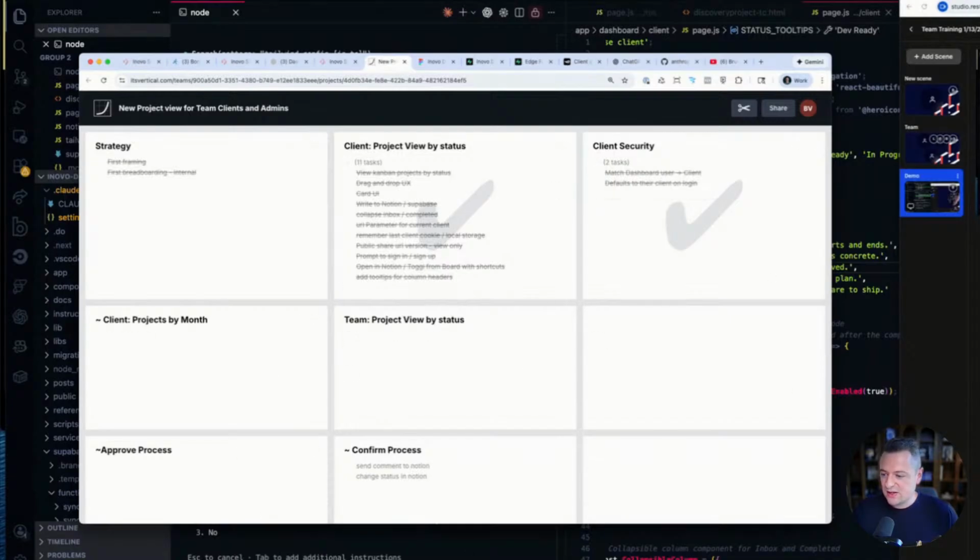So we typically go in and build those out here. You can see we don't even fill all nine. We use a little tilde here if this is nice to have if we get time for it. This is where I've spent most of my time building out some of these tasks. And you can see there's not a lot of detail here. It's just enough for me to remember it. I don't need to assign this to someone necessarily. I'm taking this whole little block myself.